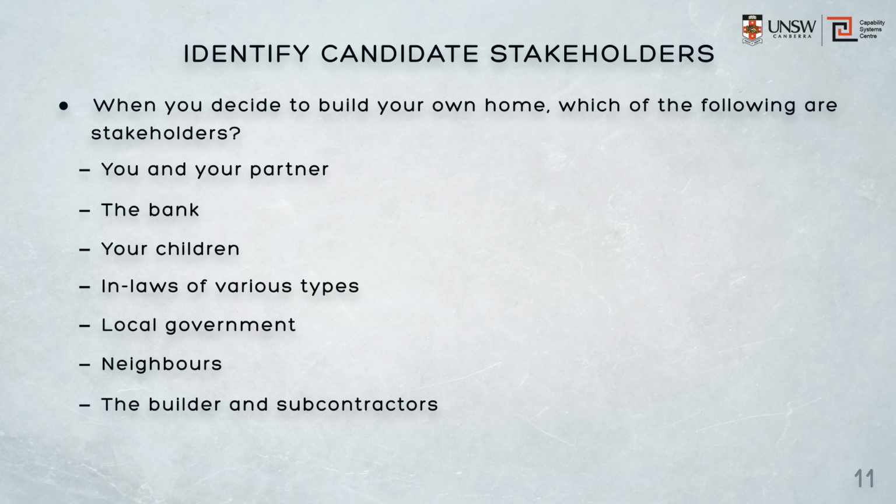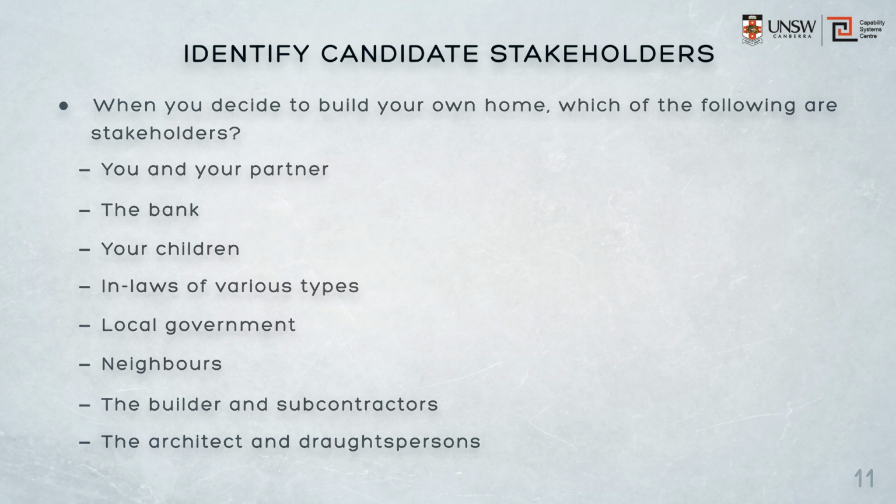Similarly with architects and draftsmen, they have considerable interest in the success of the project because their reputation will suffer if the building falls down or even looks awful when it's completed. This interest in the success of the project doesn't make them a stakeholder, however. Their skill, their availability, their interest and their enthusiasm are again constraints.